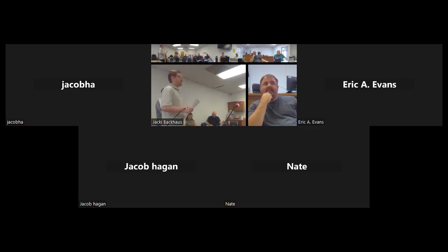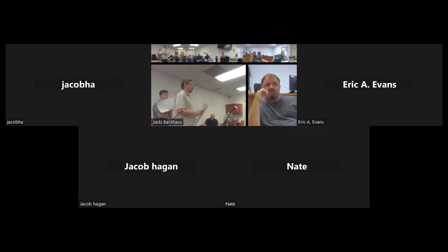I believe the severance and right of way, what we estimated, those costs were about $1 million. So the construction cost of it is about $900,000, and the right of way and severance is another $1 million on top of that.